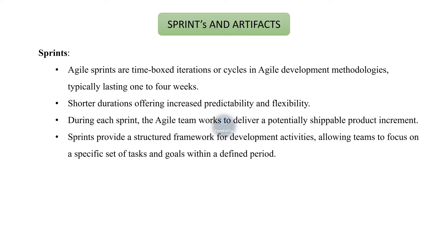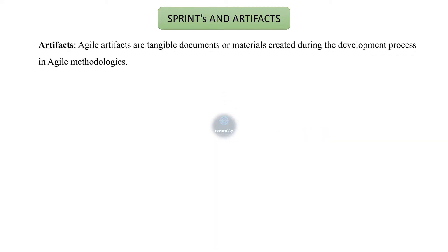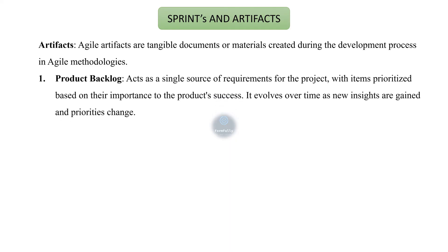Sprints provide a structured framework for development activities, allowing the team to focus on a specific set of tasks and goals within a defined period. Agile artifacts are tangible documents or materials created during the development process. The three main artifacts are the product backlog, sprint backlog, and sprint burndown chart. The product backlog acts as a single source of requirements for the project, with items prioritized based on their importance to the product's success. It evolves over time as new insights are gained and priorities change.